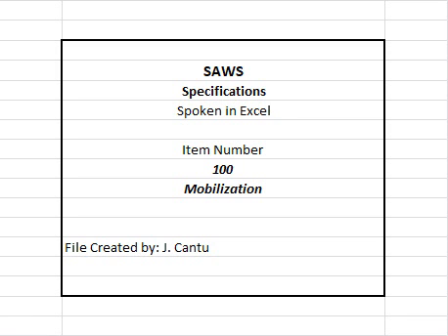100.3 Payment: Payment shall be compensation for all work including the furnishing of all materials, equipment, tools, labor, and incidentals necessary to complete the work. Payment earned for this line item will be withheld until said documents are submitted and approved by SAWS: all material submittals, Specification Item number 902, Safety and Health Program, Specification Item number 903, Construction QC/QA Program, Specification Item number 1114, Pre-construction Videos, and Specification Item number 1110, Progress Schedule.